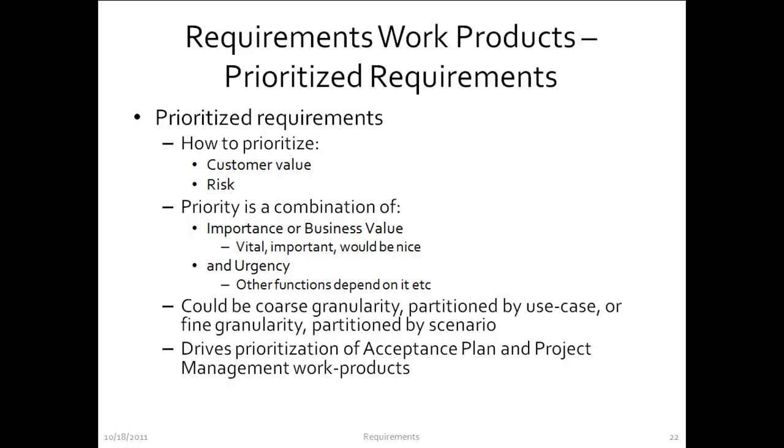So once again, the whole reason for prioritizing the requirements is to give an order to the development process, and this in turn will drive two things. It'll drive what is known as an acceptance plan that we will visit next. And then, of course, it'll drive all your project management work products, because the prioritization will determine the order in which work will be done. And so that will determine the project schedule and your release plan and iteration plan and all those other things.